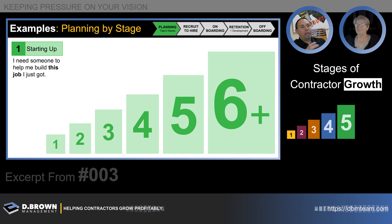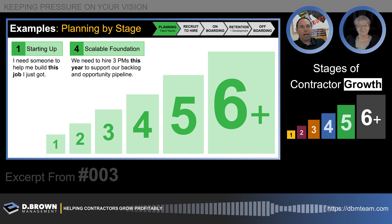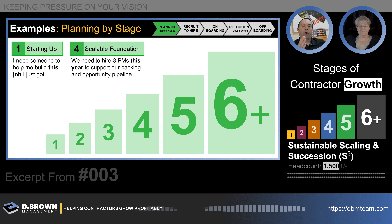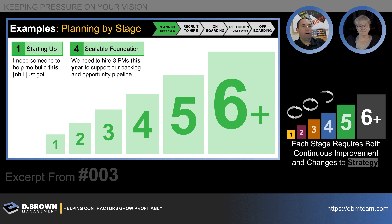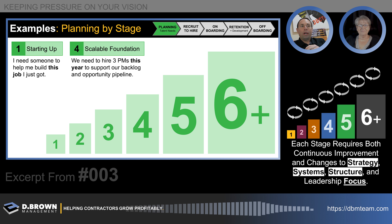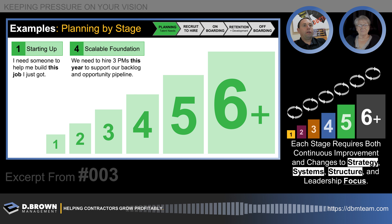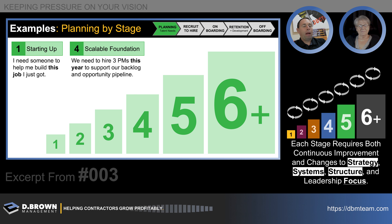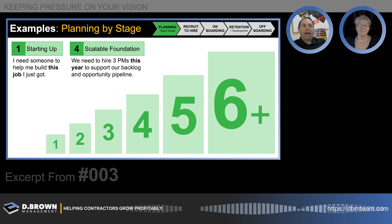By the time you progress to stage four, you've got really good control of your work-in-progress schedule and your opportunity pipeline. You're doing projects large enough to have good visibility six to twelve months ahead based on your project backlog runoff. You can look forward and say 'we need three more PMs this year, and we have one project engineer ready to promote, so we still need to bring in two outsiders.' You're probably just starting to experiment with better management of outside recruiters, and still frustrated because it's hard to manage if you're not really good at it.